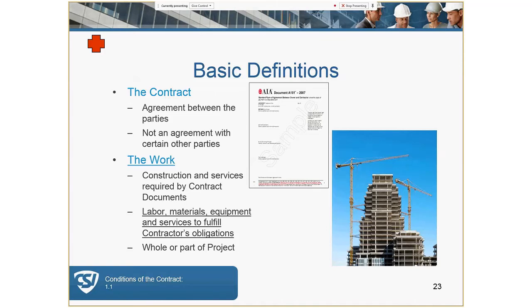The contract documents essentially form the contract for construction. Note that there is no contractual relationship between the architect, consultant, contractor, subcontractor, or material suppliers directly. There is a tripartite relationship through the other third-party agreements, but the AE and the contractor do not have a contract with one another. That's why it's important to get similar contracts from the same family.